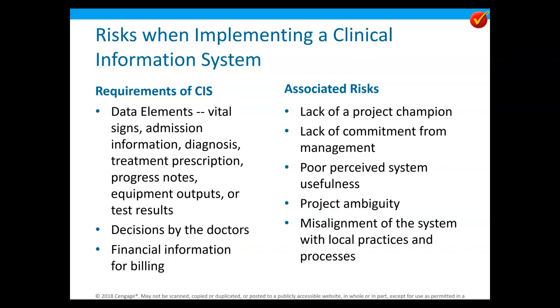So I'm going to bring out at a medical clinic a brand new system. So they list some, but I'm going to say that there's probably some other ones that are going to be in there. So one of the biggest ones in something like this is, if I don't have a champion, so I'm a small medical clinic with a couple of doctors, if I don't have one of those doctors pushing for this, am I going to be successful? If the primary users are not interested in doing this, am I going to be successful? And something like this maybe has required, and they have to implement it, well, they're not going to be very excited. So are we going to have commitment from management? Well, not if they're not also on board with this idea.